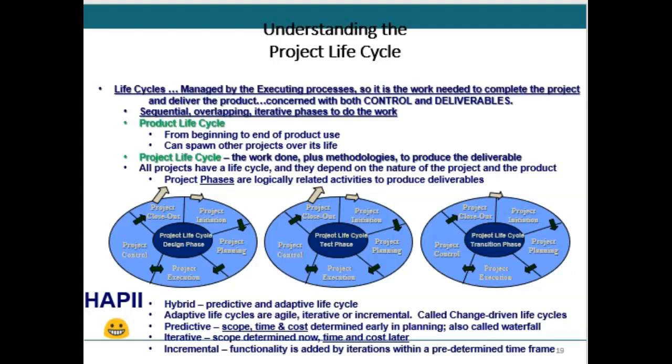Now, back to the project life cycle. So we talked about initiating, planning, executing, controlling, and closing. You'll actually do that in every single phase of the life cycle, right? So if you have a design phase, you'll do it. And at closing, you'll do a gate review. Should we continue to the next phase, right? And the answer could be yes or no. It might be no. We recommend closing the project, right?